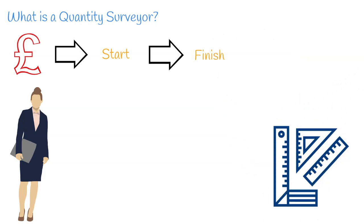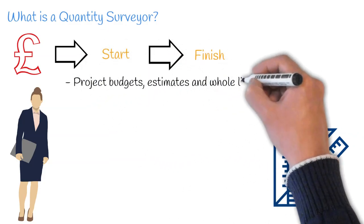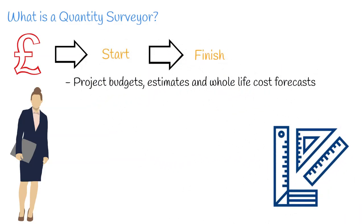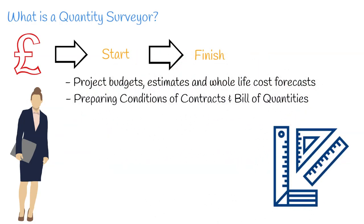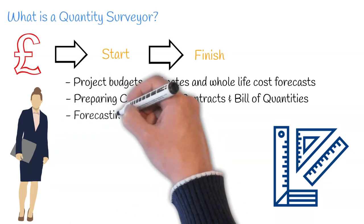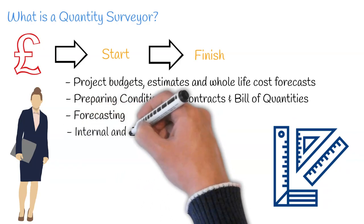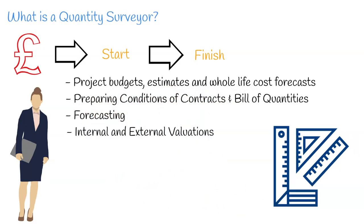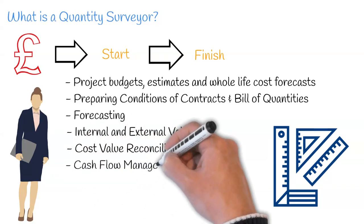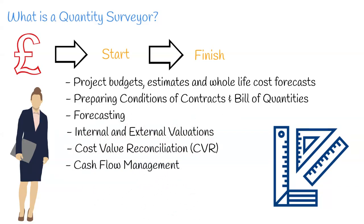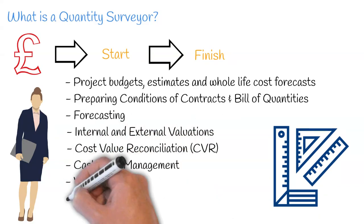The main tasks of a quantity surveyor include, but are not limited to: setting project budgets, estimates and whole life cost forecasts; preparing documents such as conditions of contracts and bill of quantities used for procurement of subcontractors; forecasting project cost to completion; internal and external valuation of work carried out; cost value reconciliation; cash flow management; variations; and finally, final accounts.